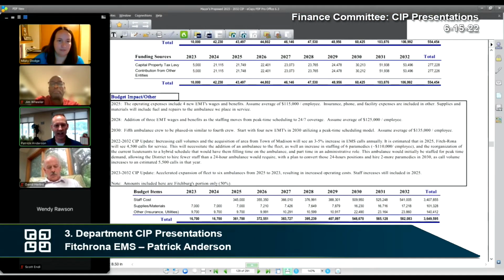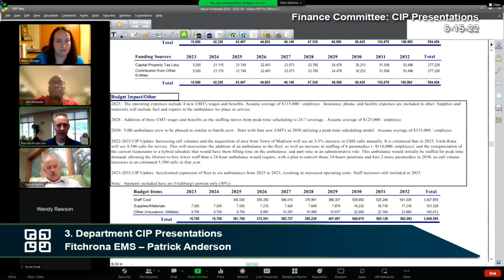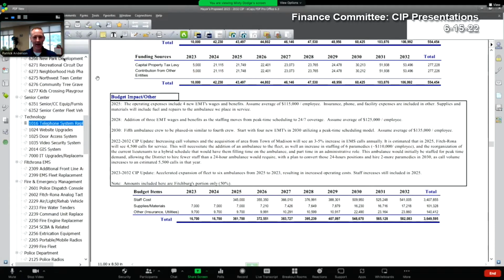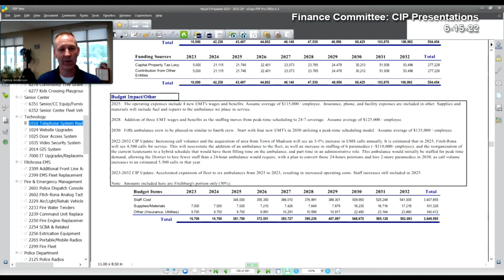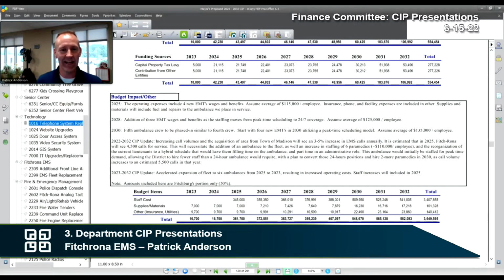I can let Misty share that. I know I've had that discussion here with the city of Verona as well. I've brought it up to Misty, like I just mentioned, we're looking at staying on our normal 2-year replacement plan. That would be purchasing an ambulance for next year in 2023. I have already been told I will not see that ambulance in 2023. So already trying to figure out exactly how we're going to work with that with the CIP process, as well as, I mentioned, 2 years from then, that purchase of an ambulance in 2025. By the end of this year, they will already be taking orders for 2025 ambulances before this year is even up. Again, we don't pay for that.